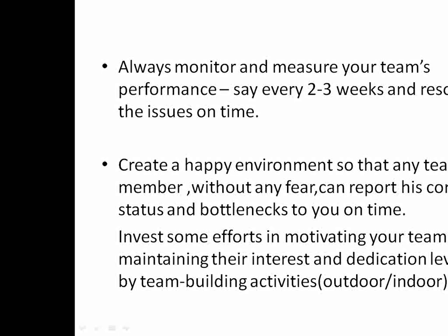One person has asked about scope control. Nowadays, when we are writing the functional specification, we always list down what is in scope and what is out of scope. As a manager, architect or lead, I have to be very clear what is in the current phase. Projects are normally 3 to 5 years, and the releases are in different phases, like phase 1, phase 2, every year there is a phase. So in the current phase, I should keep in mind what is in scope and what is out of scope, so that I don't get diverted or distracted. The moment I get distracted, it will lead to failure.